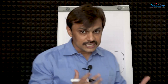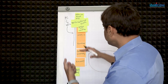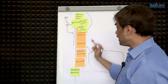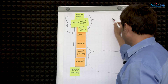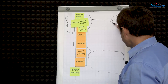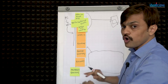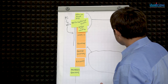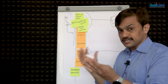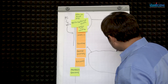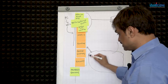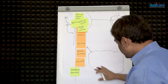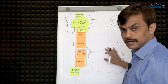You may wonder how new ideas come in. The part of the product backlog which is refined well is expected to be implemented. You run time-boxed iterations and make these items into really operable, executable, consumable items. Once users or stakeholders start looking at or using them, they may get new ideas and want to feed them back into the product backlog — either after discussion or directly, to be refined later in a backlog refinement meeting.